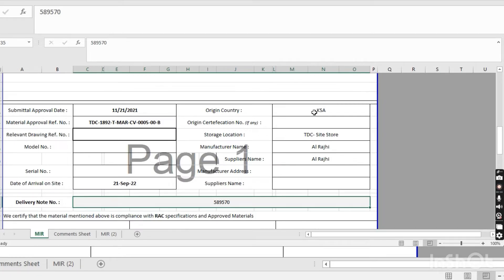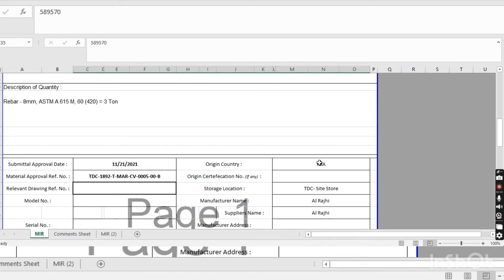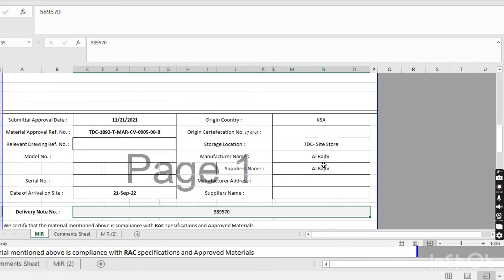The country of origin of the material is KSA. If it is KSA origin, write KSA. If it is coming from outside KSA, write the name of that country. If it is KSA, no need to put the origin certificate number. But if it is coming from outside KSA, you write the certification of origin number — the supplier or vendor will provide that number to you. For storage location, write where you store the material, such as your steel yard or store name.